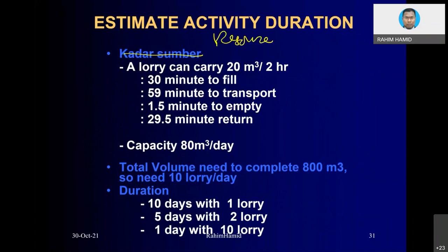A lorry can carry, let's say, 20 cubic meters in 2 hours. 2 hours means going back and forth to the dumping ground. Remember, the dumping ground is 24 kilometers away. So this lorry will have to be loaded by the excavator, filled up, and then the lorry will transport and dump the earth there.